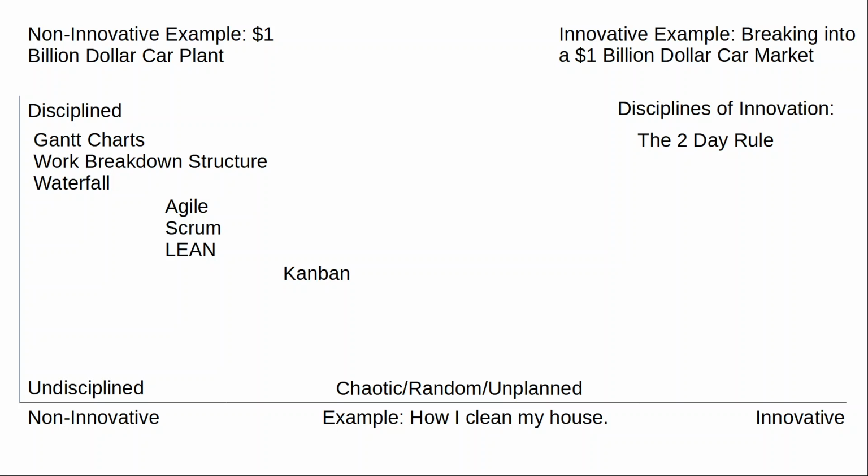And take what you learned from that and make that the foundation of the next little step that you make, and then the next little step that you make. And some of you familiar with Agile can understand that some of those concepts are from here, but instead of 2 weeks, we're talking 2 days. And ideally, 2 days is a maximum. If you can figure out something that you can deploy in 15 minutes, that's even better. The shorter, the better.